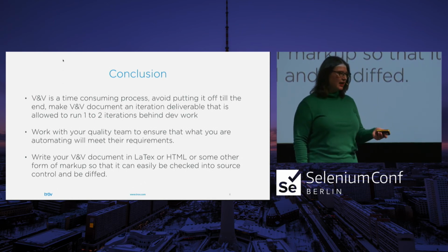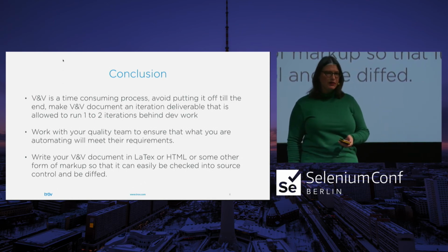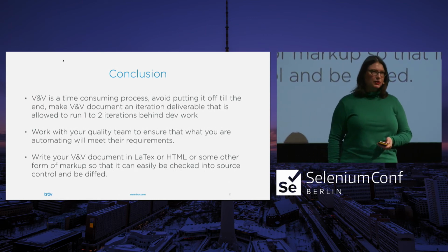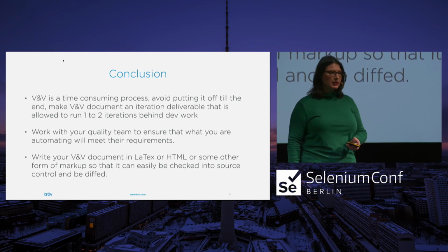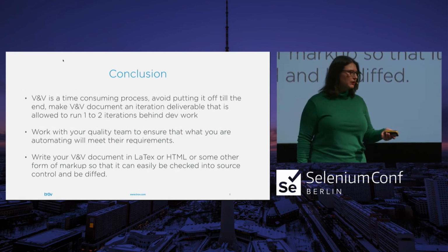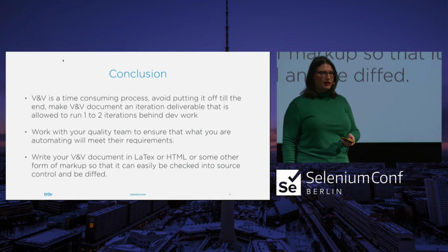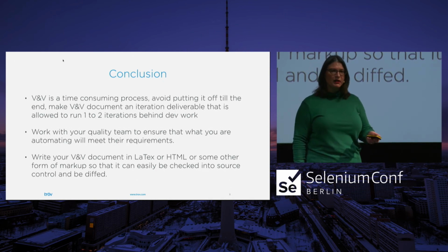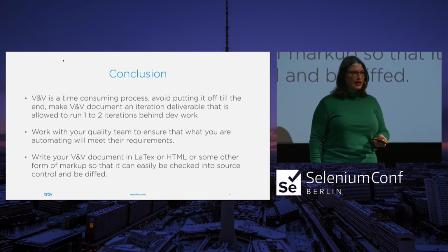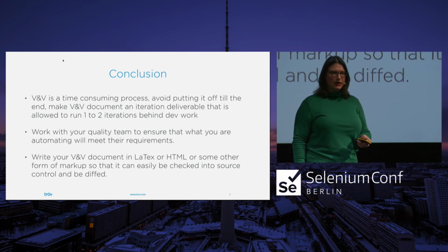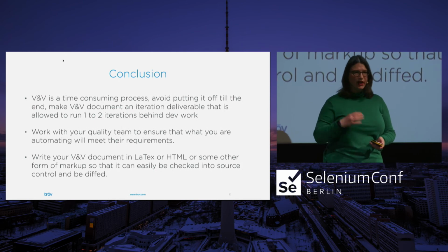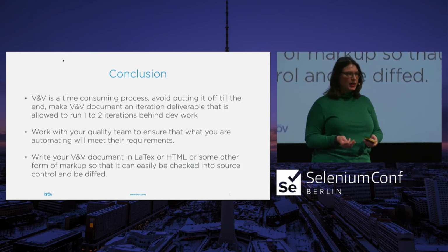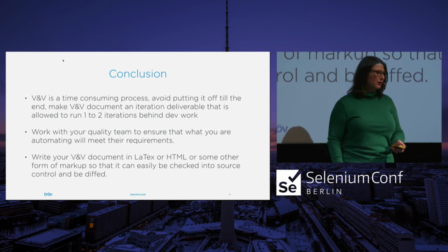If we provided it at the end of an iteration and required sign-off, that would have forced our customers to provide feedback early and often on the document, which wound up being necessary, because this is their document. Like, we were contracted out. And if the document isn't going to work for them, they're not going to get the approval they need. They're going to be really dissatisfied with the work that we did for them, because the application might be great, but if they can't get FDA approval and they have to rewrite the document, we haven't helped them at all. We have not done our job as a consulting company.